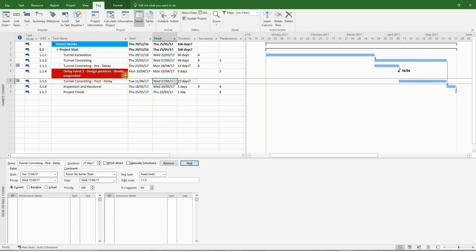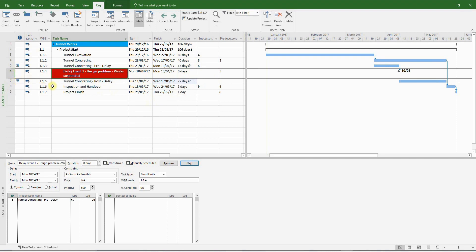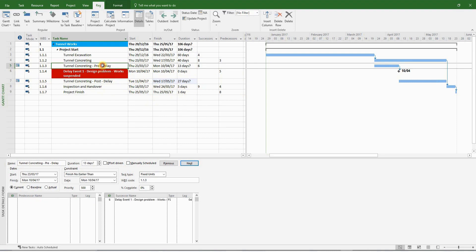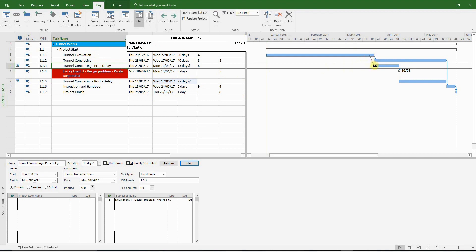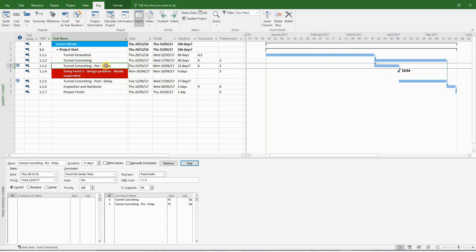Now there are some question marks after these durations. Because MS Project is estimating these days, we will correct it. And you can also see these small icons in the information columns. These are constraints inserted by MS Project, and we will remove them shortly. For the moment, let's put a finish to start link between the tunnel excavation and the tunnel concreting pre-delay activity.